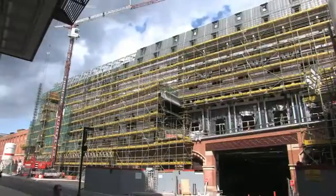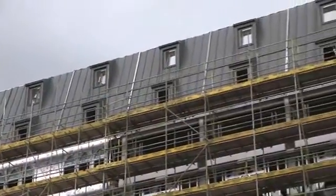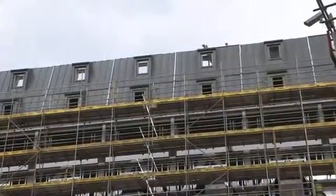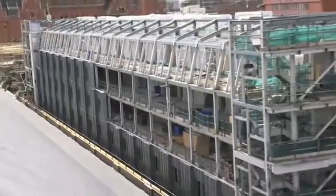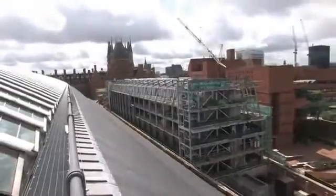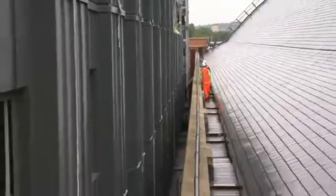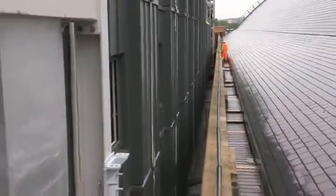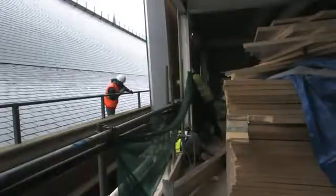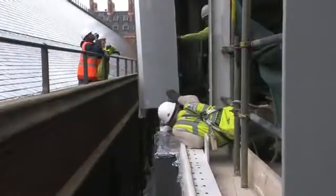22 mansard panels, incorporating pre-fitted dormer window structures, were craned into position on the western elevation in just 3 days. However, the eastern elevation proved more of a construction challenge. Its very close proximity to the precious Welsh slate roof and boundary wall of St Pancras Eurostar Terminal meant that a prefabricated method of installing the wall cladding and the elimination of static scaffold access would reduce the risk to health and safety and prevent potential damage to the adjacent structures.